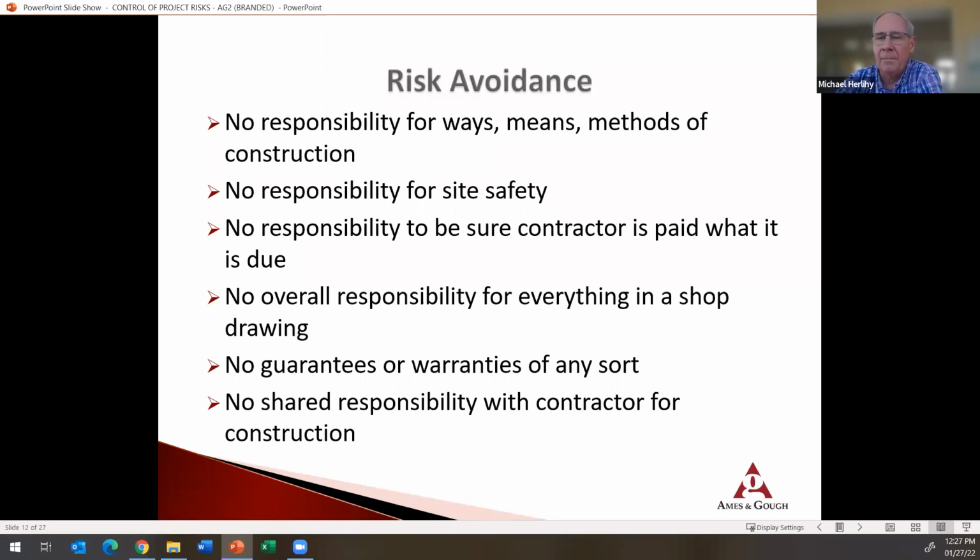and to reinforce it by saying we had no responsibility for site safety other than to verify there was a safety plan. So we had to get really down in the weeds on the contracts and actually coordinated the engineering agreement with the contractor agreement to reinforce that this was the contractor's duty, so that we wouldn't have somebody say, "Well, I see in your contract you had to verify there was site safety. Didn't you take on a companion duty with the contractor?" We wanted to avoid that because we didn't have any control over the work and couldn't stop the work if we saw something unsafe.